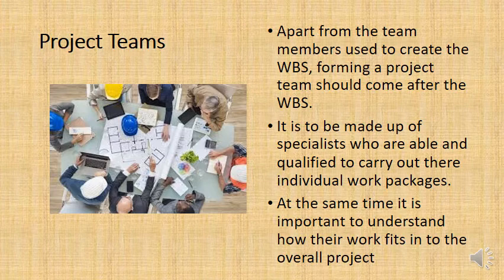Other than the people involved in the project who make the work breakdown structure, you always form the team after the work breakdown structure. You're looking at the work packages and you're saying, who do we need to achieve these packages? And you're basically going to need to get specialists to find people who are qualified to carry out the individual work packages. You're never going to find someone who can achieve all the work packages, and if you can, it's probably going to be a low quality project because there's been no specialist input.